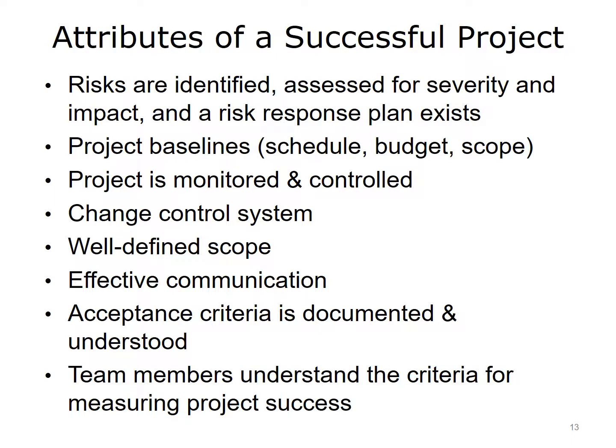It is also valuable as a change control system, and that goes right in line with the next item, a well-defined scope. Any of us who have worked on projects know that scope creep or changes to the scope of the project are very common, and so it is important to have a change control system that allows you to accommodate change, but also to control it very well, and to document it when it happens. Effective communication is also a very, very important part of successful projects.